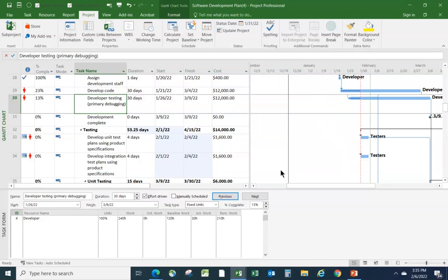So slowly what we've been doing is getting more and more detailed in reflecting some of the things that people will actually tell you. It's unlikely that someone will just say 50% complete. But if they do, even then, dig in a little bit. Say, okay, did you start when you were expected to start, as you were scheduled to, and are you still planning to finish, do you think, at the original finish date? And if either of those is not a straight yes answer, then update the schedule accordingly.